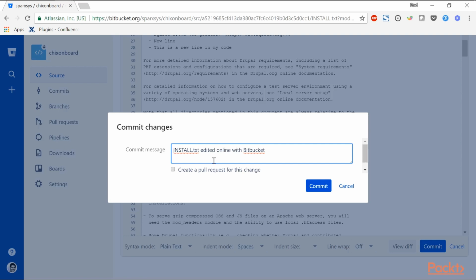So for this example, I just want to show you how we can mention the issue key in the commit message. So all you need to do, you need to mention the issue key, which is SSPC-1, and you can also provide some smart commit messages. So if you want to also start the progress of the issue, you can simply say #in-progress. And this means that as a developer, I want to show that I have started the work on the issue. So you can say that in progress, which is the status name in the workflow.